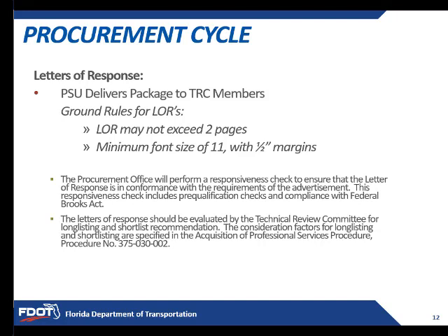So letters of response. We get our 2-page letters of response. PSU delivers those packages to your TRC members, and there's some ground rules. The letters of response may not exceed 2 pages. And then there's the minimum font size and margins. So these are important things to keep in mind. Typically, they're evaluated based on the font and the margins. They're evaluated by PSU, and before your TRC members see that, they're going to let you know if there was a problem with the letter or not.